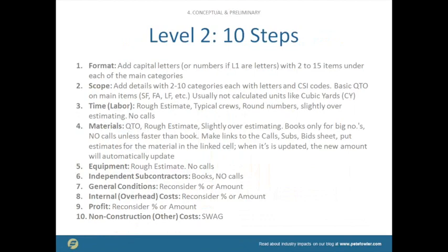On the right elevation, on the back elevation, oh, wow, hold on. On the back elevation, we've got 4 sets of 9-foot-tall double French doors. Those are going to be, wow, that's when we start breaking it down. Because you might say, uh-oh, we didn't estimate enough. I bet these windows are going to cost $125,000. So then we just go through the estimate, literally all those 10 steps again, at a greater level of detail.